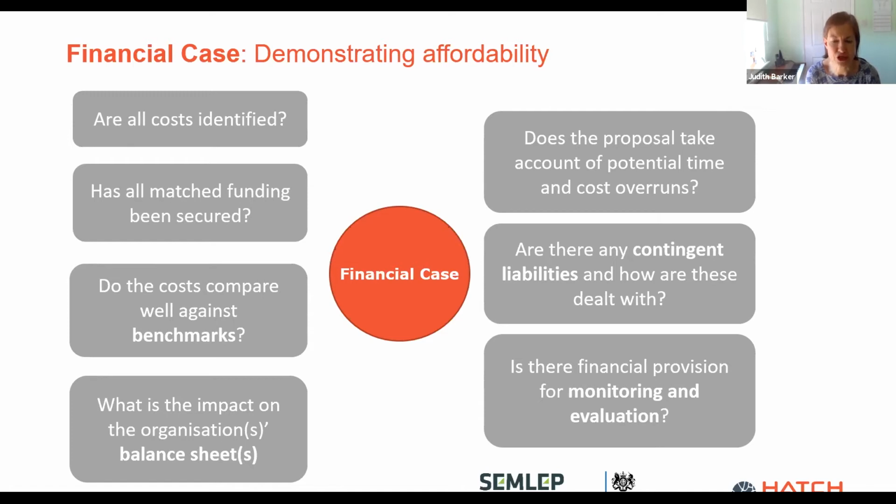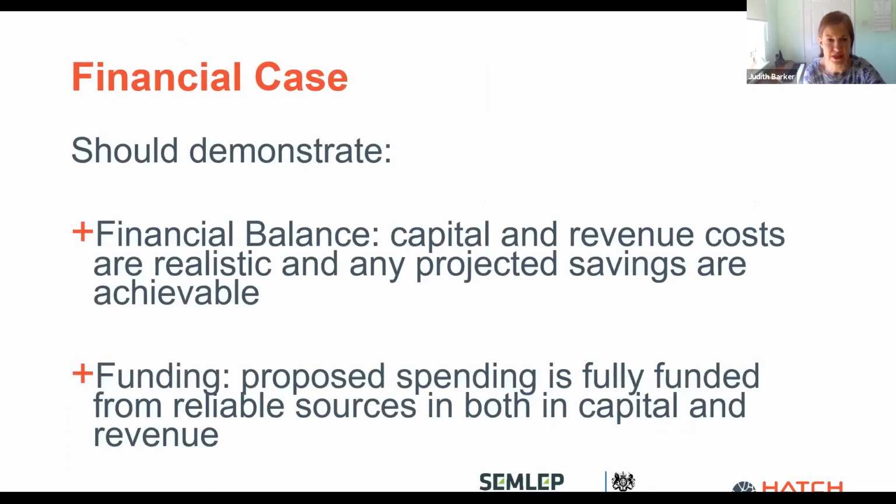And then finally, do make sure, if it's a requirement of the fund, which is on Levelling Up and Community Renewal, that you've made provision for monitoring and evaluation. So you need to build in the financial cost of doing that activity as well. So hopefully that gives you a quick guide of the different aspects of that financial case to consider.